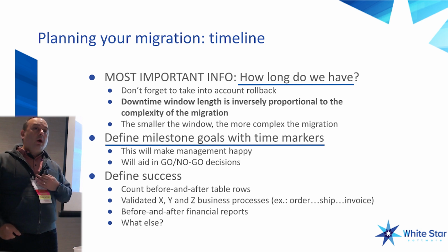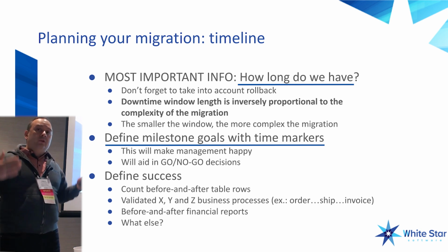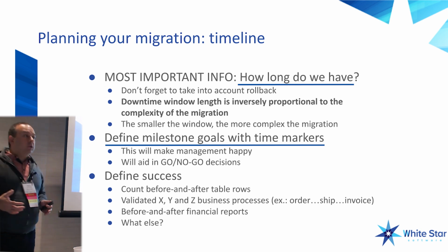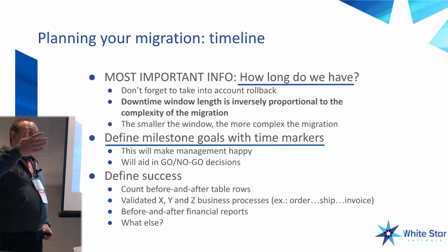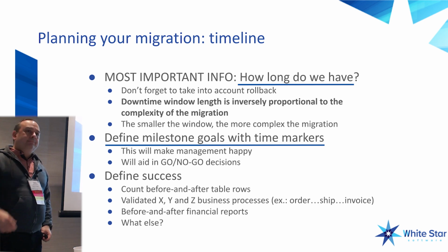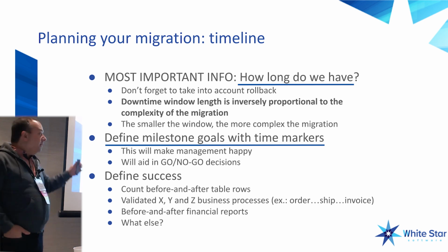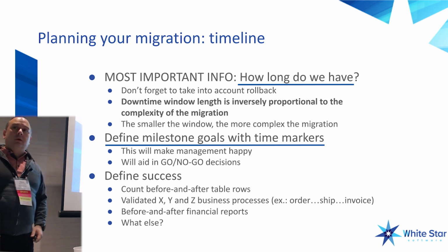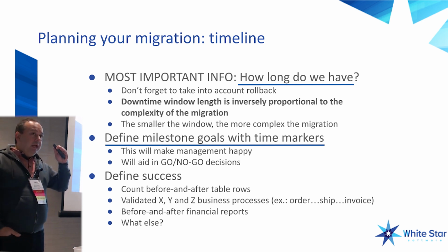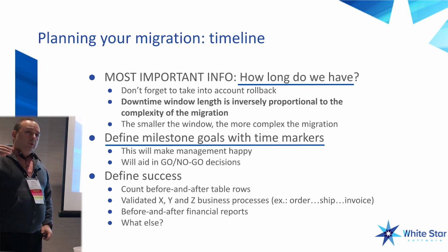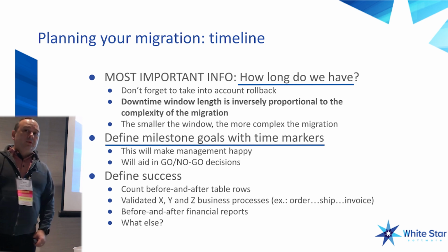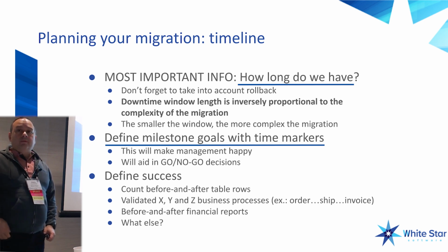It also means if you have these markers, you can more objectively make the decision to scrap the migration, right? And it's really hard. You work so hard for so long to prepare this migration. It's really, really hard to look your customer or your boss in the eyes and say, scrap. We're not going to make it. This is not going to work. But if you have all of this documented with time markers, it's easier to make that objective decision to say, we're not going to make it. Stop, go back. Monday we'll regroup, we'll do a post-mortem, and we'll schedule to try again in a month or whatever the case may be.